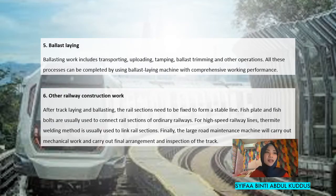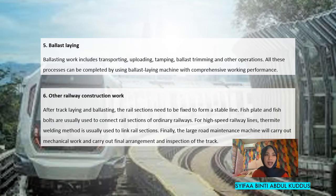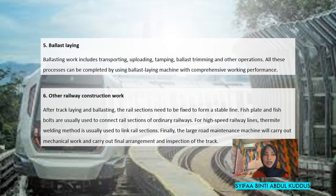The fifth step is ballast laying, which includes transporting, unloading, tamping, ballast trimming, and other operations — all completed using a ballast laying machine with comprehensive working performance. The sixth and last step covers other railway construction work after track laying and ballasting. The rail sections need to be fixed to form a stable line. Fish plates and fish bolts are used to connect rail sections of ordinary railways. For high-speed railway lines, thermite welding is used to link rail sections. Finally, large road maintenance machines carry out mechanical work and the final arrangement and inspection of the track.